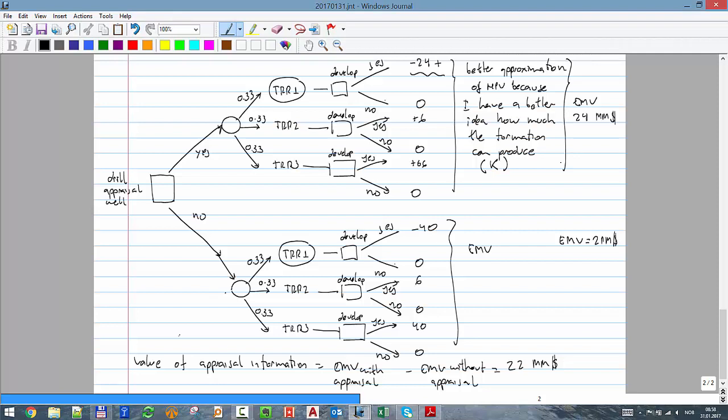branch. And we can compare two branches and say, well, the difference is really what I'm getting extra by drilling this appraisal well. Okay, then I can say if my well, for example, costs 50 million, it's not worth making the appraisal. I'm going to spend much more money than just the gain I will have by doing the appraisal. Okay, if my well costs 5 million, then I can say, okay, let's drill it, because the difference is much bigger than the cost of the actual action. Okay.